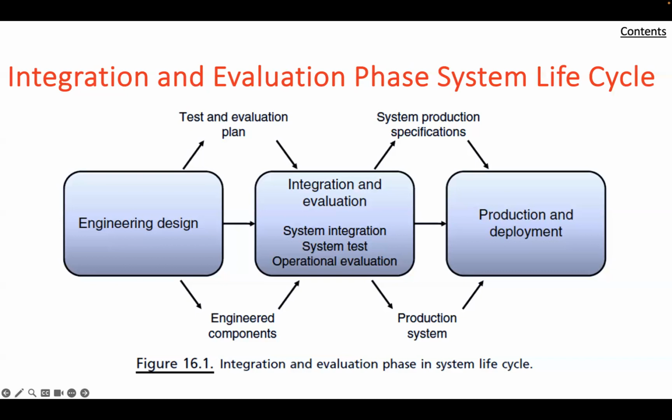that fully engineered components and subsystems are linked to one another and made to perform as a unified functional entity. Despite the best plans and efforts, the integration of a system containing newly developed elements is almost certain to reveal unexpected incompatibilities. At this late stage in the development, such incompatibilities must be resolved in a matter of days rather than weeks or months. The same is true when deficiencies are discovered in system evaluation tests.